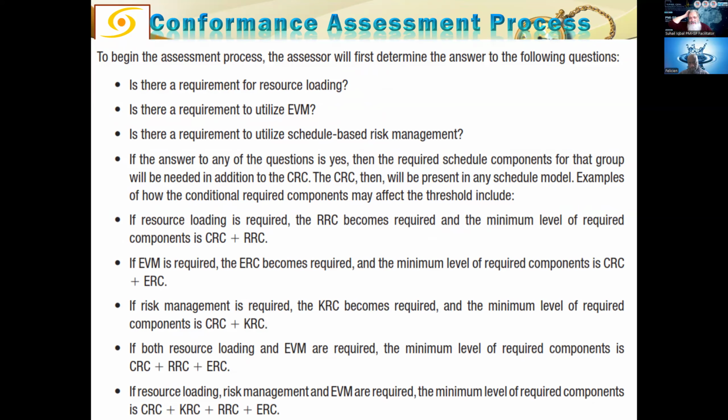There are certain questions you have to ask before starting the assessment of the schedule. Number one, are you doing resource loading in your project? If you're not doing resource loading in your project, then RRC is not required. Is there a requirement to utilize earned value management? If the answer is no, then EVM is also optional for you.